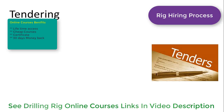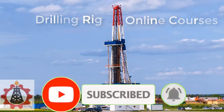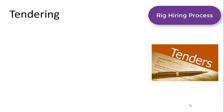The operator company who wants to drill the well will initiate the process of tendering. A tender is an invitation document in which the operator company provides their specification requirements for the rig — like what size of drilling rig in terms of horsepower, how much should be the mud capacity, how much should be the draw works and mud pump horsepower, what depth they would like to drill the well, how much will be the maximum casing running weight, and what size and pressure rating of the BOP the operator wants.